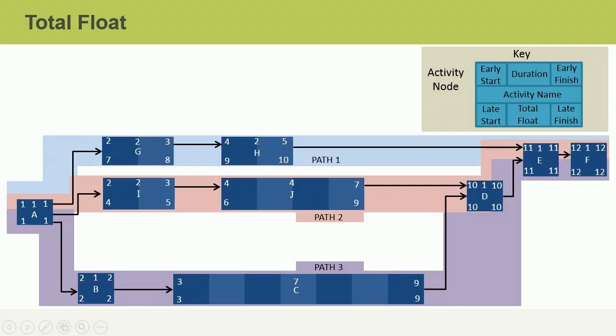When we use a schedule network diagram to perform a forward pass and a backward pass, the goal is to determine whether we have any flexibility in our schedule. The flexibility in our schedule is also known as float. We are going to review each activity one by one to determine if that activity has flexibility with when it can start and finish.